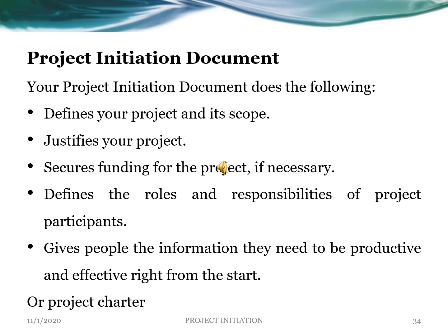The project initiation document is a very important document. It normally does the following. It defines your project and its scope. It justifies your project. It helps to secure funding for the project wherever necessary. It defines the role and responsibilities of project participants, and sometimes gives people the information they need to be productive and effective right from the start. It may take another name. We may call it also a project charter.